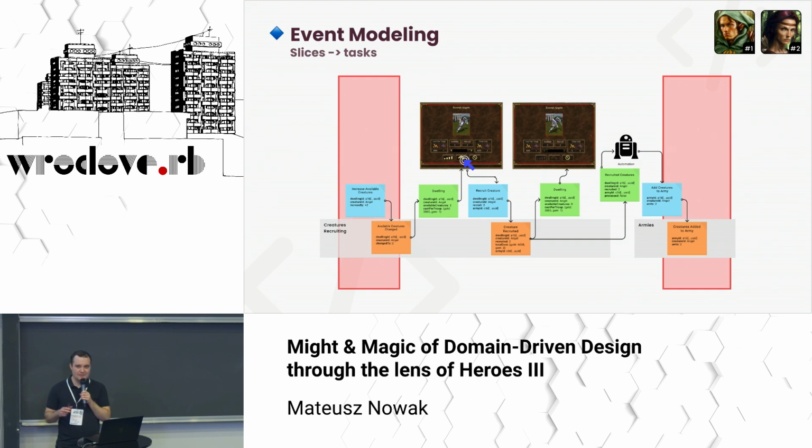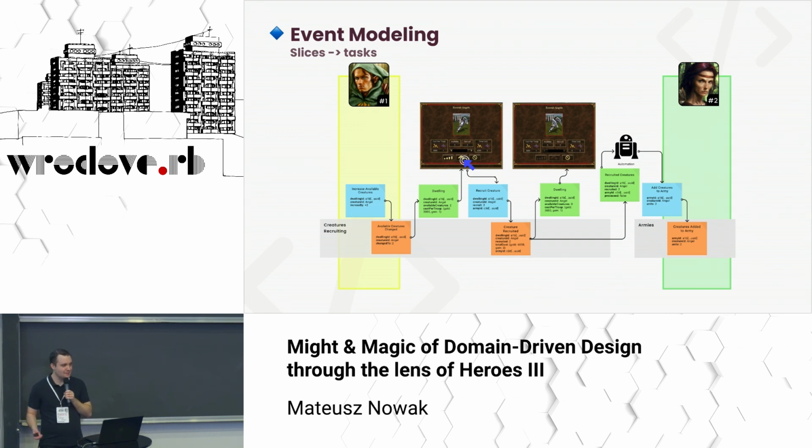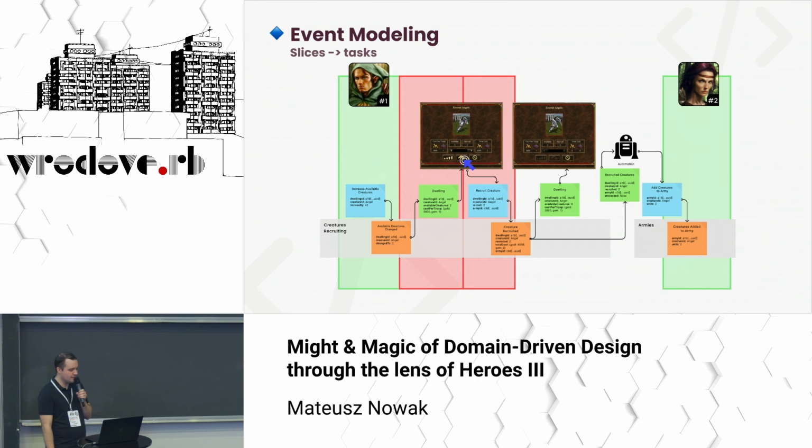So where to start the work? The first decision is very simple because we have two distinct modules. Those modules do not know about each other and do not communicate. So we assign developers to the two distinct modules, and they can work on their own at the same time. The slices we are to do are marked in red. Yellow slice is in progress, and the green one is done. The modules don't know about each other, so the developers started their work. They do not need to wait for anything.